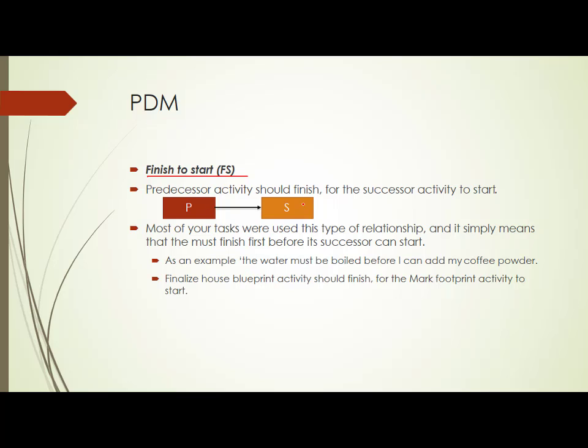So for example, I told you in the last class, you have 2 activities. One is leveling the ground, and the other is marking the foundation, or making the layout of the house. Now can I do the marking before leveling the ground? It is not possible. So first I have to level the ground. After I have leveled the ground completely, after this activity is completely finished, then only I can start with marking.